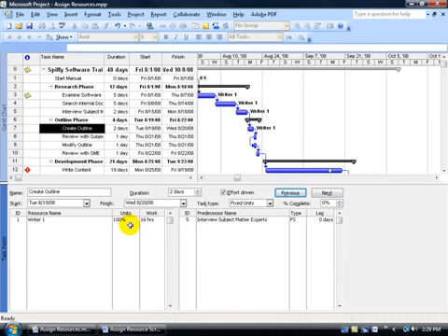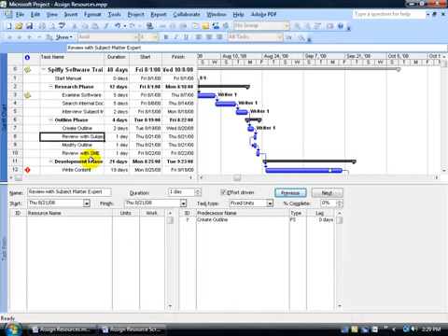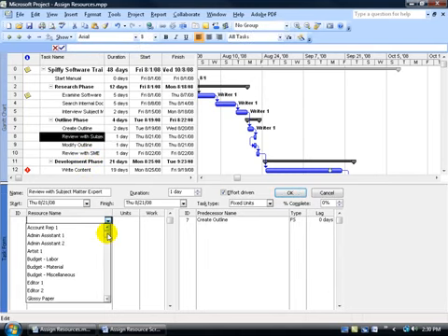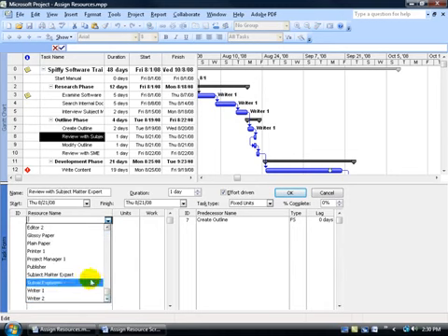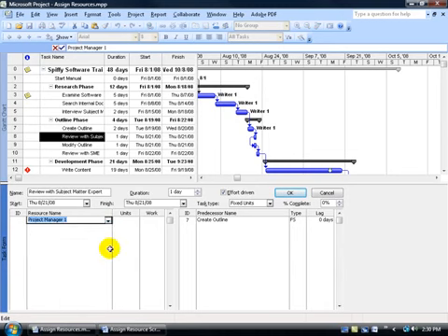Okay, let's say that somebody's not going to be working a full 100% here. Let's go to the next task, 8, and let me click in the blank area down below, and let's choose our project manager here and say, instead of working 100%, we can either come over here and click in the units field and go down to 50% and then click OK, or click OK and then make the change. Either way, what we're saying here is when you're working at 50%, you're working at half.